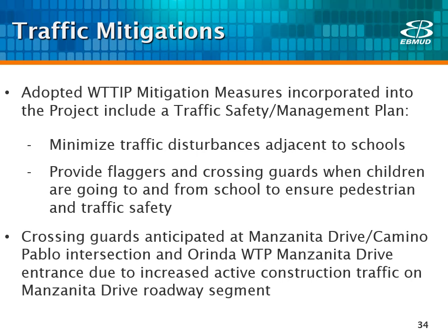Much of the potential traffic impacts during peak traffic periods has been minimized by restricting the hours for heavy truck traffic outside of peak commute hours. However, we do have several traffic measures incorporated into the project, including a requirement that a traffic safety and management plan be prepared that would minimize traffic disturbances adjacent to school and provide flaggers and crossing guards when children are going to and from school to ensure pedestrian and traffic safety.